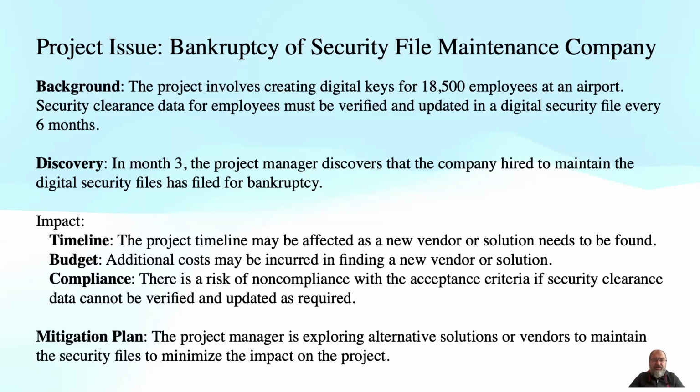Moreover, there is a risk of non-compliance with the project's acceptance criteria if security clearance data cannot be verified and updated as required. To mitigate these impacts, you are actively exploring alternative solutions or vendors to maintain the security files and minimize the disruption to the project.